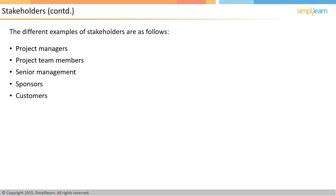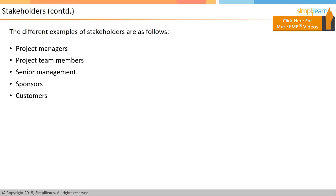The customer, which may be different from the sponsor, is a stakeholder as well. For instance, in many projects in the social sector, the sponsor may be the government or a development agency, whereas the customers would be the people who actually benefit from it. The end users, which may be different from the customers or the sponsors, are stakeholders too.